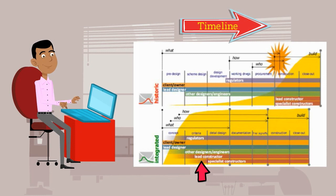See the early involvement of all participants in IPD projects. Even the lead constructor is taking part of the project at early stages. When this happens, it is possible to identify how to do it, who do it and what to do from the very beginning. Not as non-IPD projects, when we know how to construct when we start with drawings and some participants are identified right before the construction stage. This produces a clash when the lead constructor arrives. Now you know why so many claims in the construction sector demanded by the contractors exist.